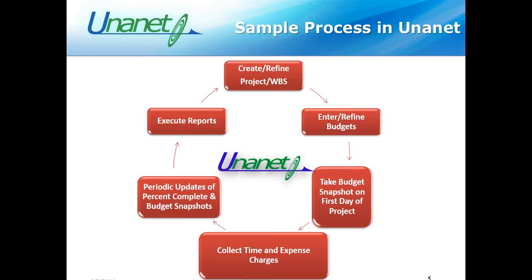Our budgets can be entered in Unanet at the project level and or the task WBS level. It's entirely up to you at which level you want to collect and aggregate your costs. Once you have your budgets defined, what we recommend you do is take something called a budget snapshot on the first day of your project. Once your contract's been awarded, you've set it up in Unanet, take a budget snapshot of your project.